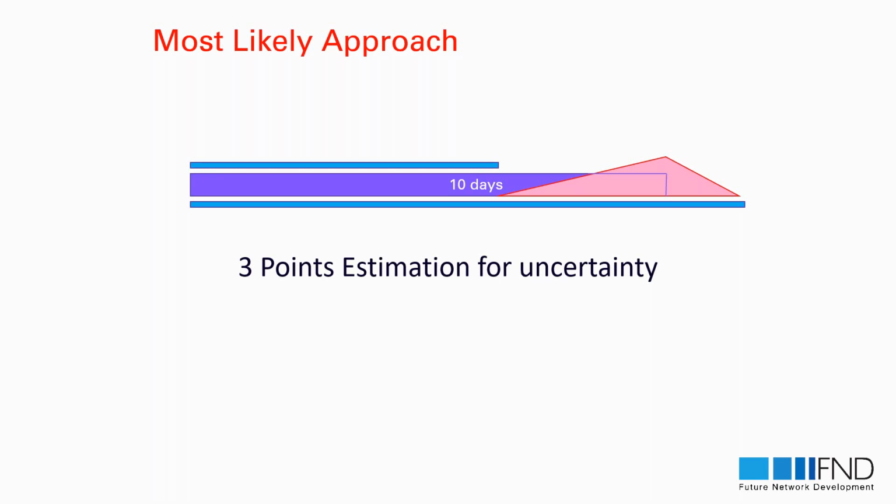What does it mean? The next time our planner has a meeting with me and asks me, Tekin, could you please tell me how much time you need, how many days you can finish the work? I can talk to my planner like that. All right, this job is optimum 10 days. This is the average, 10 days. But if I have material on site, design documents ready, nobody gets ill, everybody is on site, there is no weather problem, no COVID cases, I am going to finish this job in 7 days.